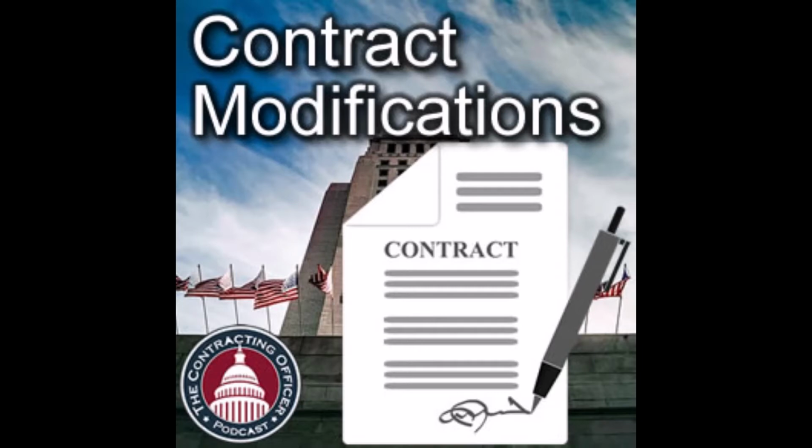Yeah, and let me zoom out for a second. Now, this is contract modification. Now, it sounds like we're doing a letter contract. Well, that's when you're setting up the contract from zero, like you didn't have an agreement. And what you're talking about is you have an agreement. You know that instead of the train going from here to Newark, it actually needs to go from here to New York City. The longer you wait to tell the contractor, stop going to Newark and go to New York City, is bad, right? That's the purpose of this clause.